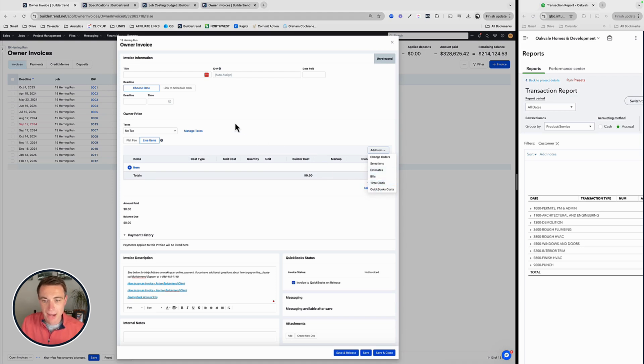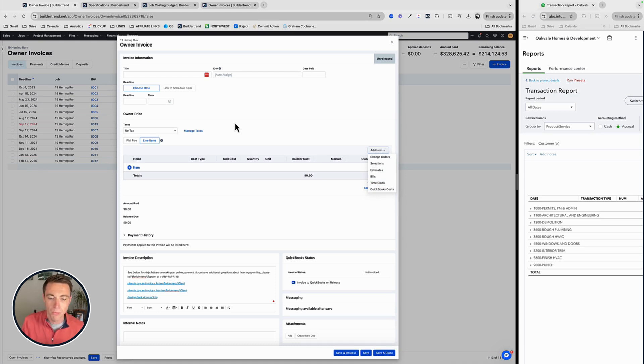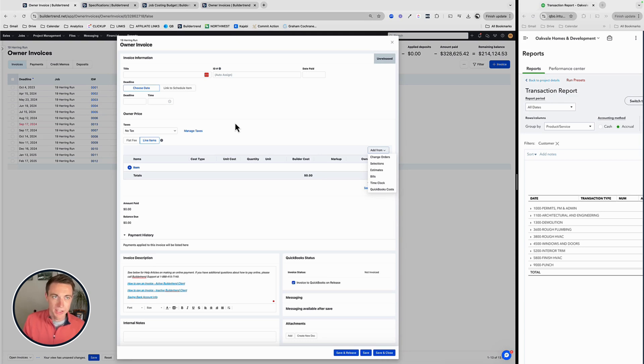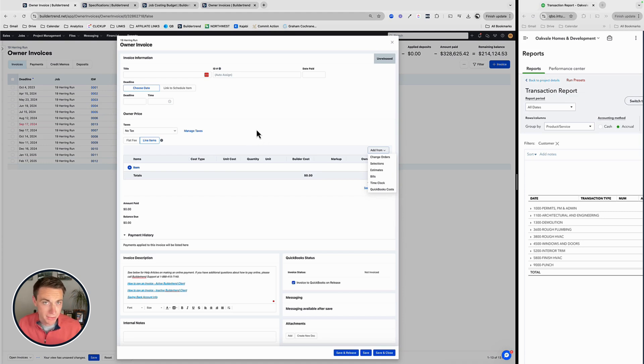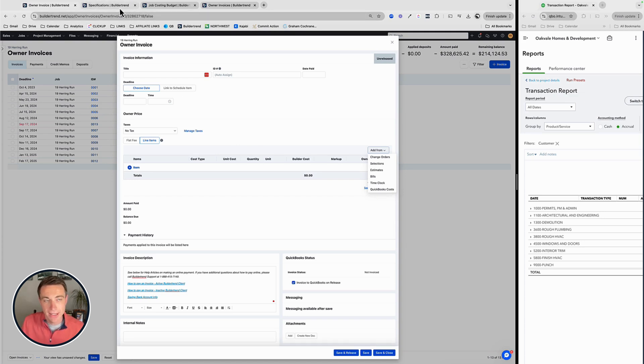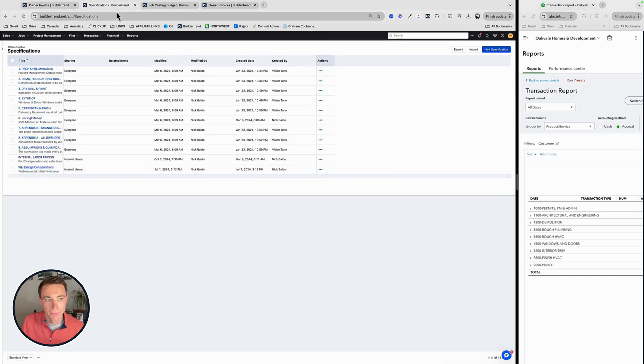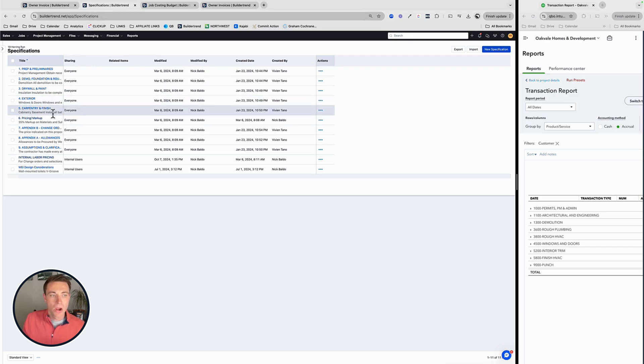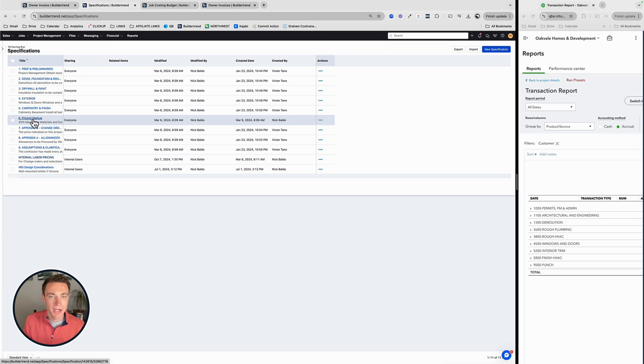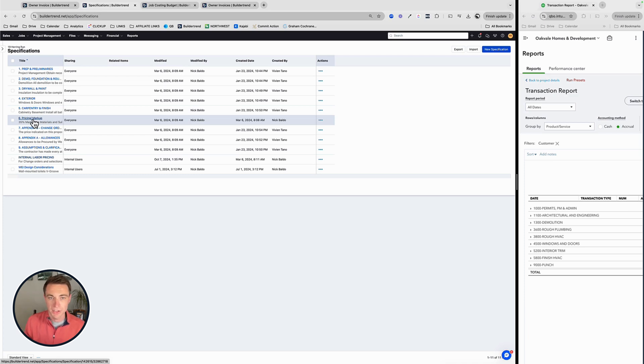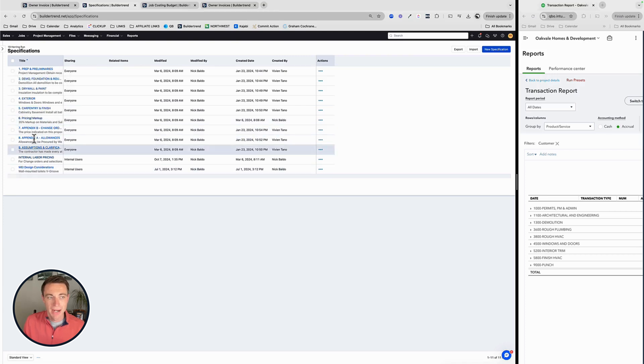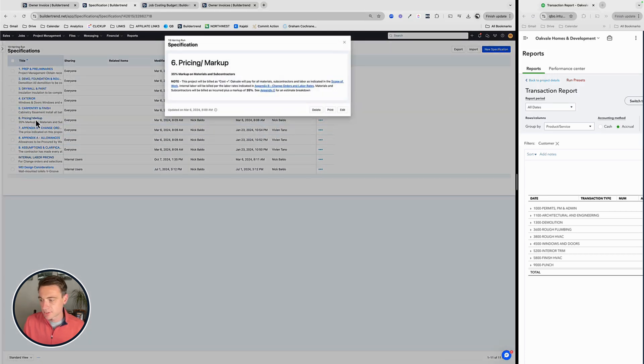So I'm going to go ahead and I can add one of these. Before I do, I want to think about what the markup is going to be on all of this. So a really important component of any open book priced project is we have to be very transparent with our customer what our markup is going to be. It's not going to be zero. We can't possibly make money with that. We have to understand what our markup is going to be. And I find it is a really good place. I had a video on specifications a bit ago. I think that adding your markup and your specifications is a really good place. Whether it's transparency for your customer, they will have known about it already in the contract, but also for your team. So if you have somebody else who's helping to create invoices, whether it's a VA, a bookkeeper, or just somebody else on your team, they can reference every project might have a different markup and it might be different for different cost types as well.